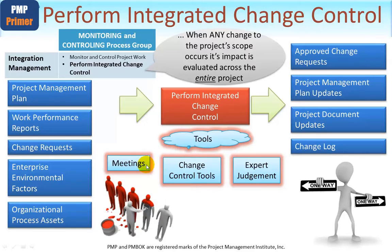If you do have a change control board, they normally have the authority to say yes or no to changes, so they will be responsible for reviewing all changes. Exactly how far the authority of a change control board goes will depend on a project-by-project basis.